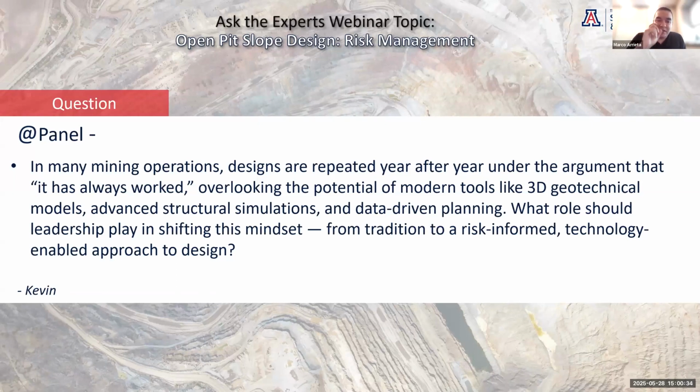Look, this large structure is present. The uncertainty associated with that is X. The consequence of not drilling and planning properly is Y. Usually in the mining industry, hundreds of millions of dollars. And if you don't take care of this problem, in 3, 4, 5, 6, 10 years it's going to be present and it's going to compromise your mining sequence. So shifting from reactive to proactive, and I really love how John Freeman is talking in their language, communicating in the consequences space, which means money.